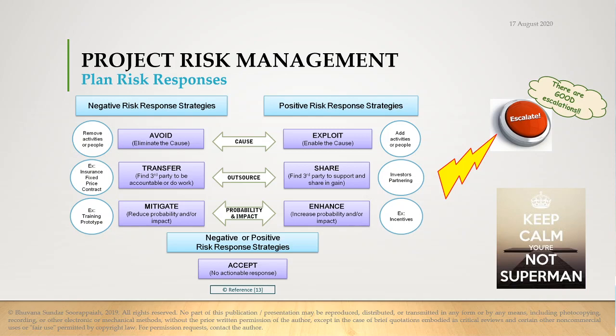Now whatever policies are there, you will straight away start planning a replacement. You will request her to stop working on the main activities. Instead, can you please groom someone to be a replacement and work along with that person. Good. But you can put this in the main risk register. Person X, Miss X or Mrs. X basically will be going on a long leave. Personal medical reasons you need not mention in the main risk register. You can just put: is expected to go on a long leave for personal reasons from this date for this duration. That will affect activities that she is involved with, because she is the critical expert in the team. So you need to find a replacement. This is the risk statement you are entering in the risk register.